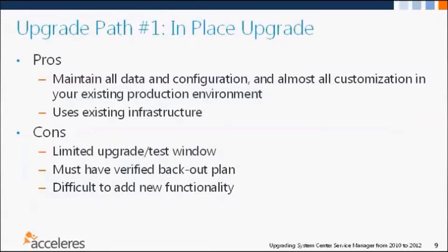There are some cons, though, and we do want to call these out because primary to these is the limited upgrade window. I think the biggest disadvantage to this path is it's going to cause downtime. You're going to have to shut down production access. And if you are a 24/7 service desk, that may present some issues for you. And you've got a limited window in order to get everything upgraded, new functionality added, and everything tested, while still leaving enough time at the end of all of that for a rollback if you need to.